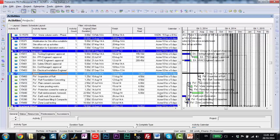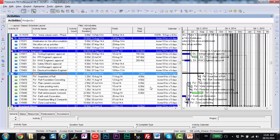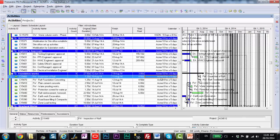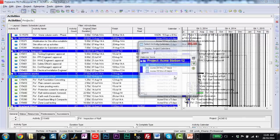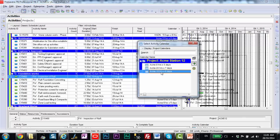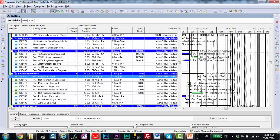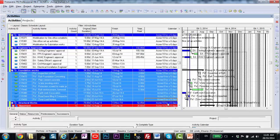Well, showing the decimal can lead you to uncovering some important things about how your project's been built. So, for example, if I open this up a little bit, I can see my calendars now. And I'll notice that my calendar throughout is pretty much this 10-day, 6-hour. But for this section, for demonstration purposes, I've switched it over to the 8-hour by 5-day calendar. And by switching that calendar, I actually change these duration values.